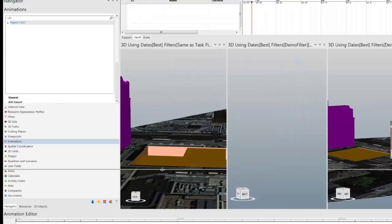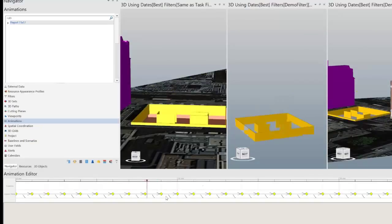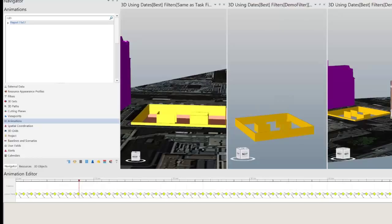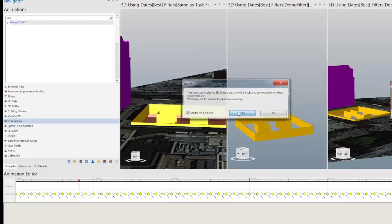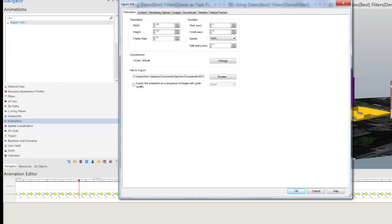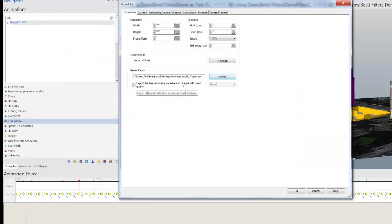What this has done is created a time step for every week for the full duration of the project — in this case out to about 52 seconds. Now we're ready to create the report. Right-click and hit 'Export AVI.' Change the width to 5100 and height to 3300, which is the size of the image. Set the frame rate to one because we're only exporting one report per second. Export it out as 'Weekly Reports' and set it to export the animation as a sequence of images, so you're not exporting a video.